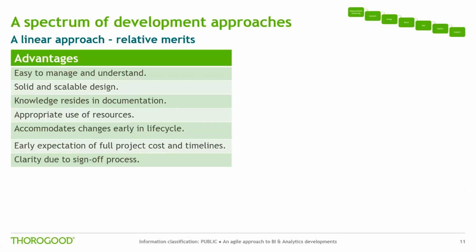It accommodates changes to personnel due to the project knowledge residing in documentation rather than key team members. There is appropriate use of personnel and resources at various stages of the life cycle, so not full-time and not full cost. It easily accommodates changes to requirements and design early in the project before any code is developed.